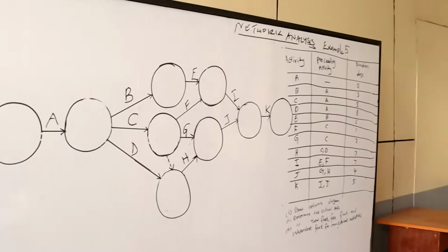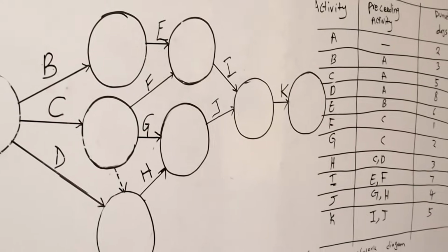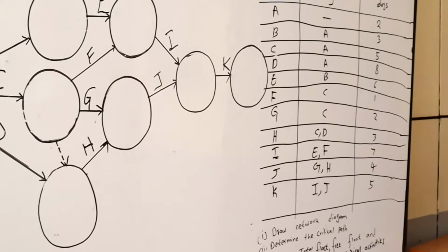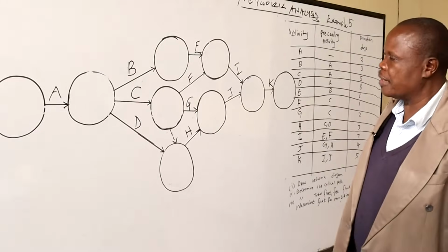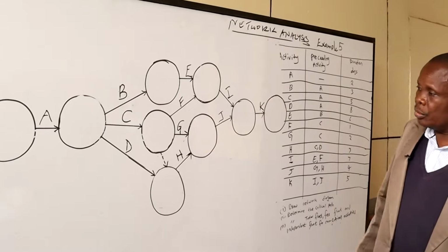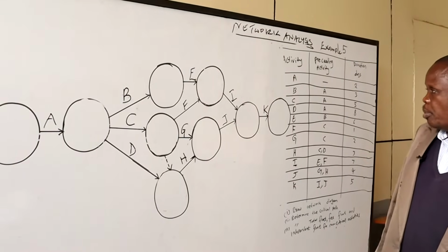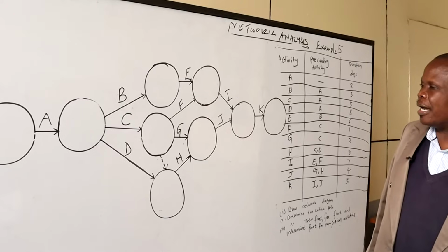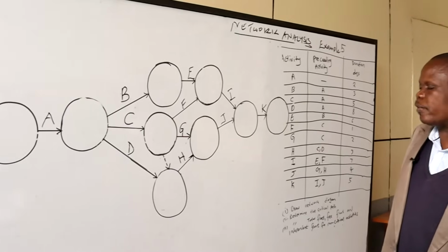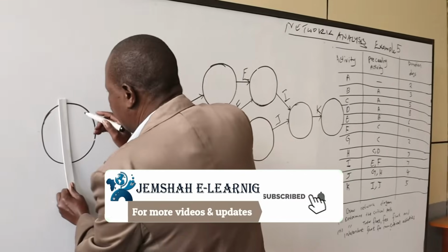So that is the network, but we are not yet through, because we must take into consideration the duration. Earlier, some minutes ago, I had said that when you construct a network using time estimate, you must subdivide each node into 3 parts. So at this point, we must subdivide each node into 3 parts to accommodate the event's earliest time and latest time. So we start from here.